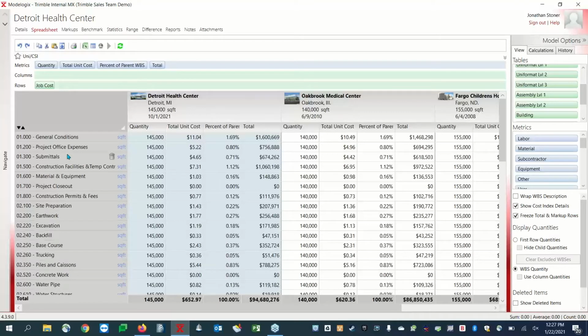But unless your accounting codes also coincide with the way that you sort your projects, you better compare that to what is in your estimate, the way you originally created your estimate. And if you've got it broken down that way, you might just want to try and run the report and update the pricing, the final pricing, before you import it in.